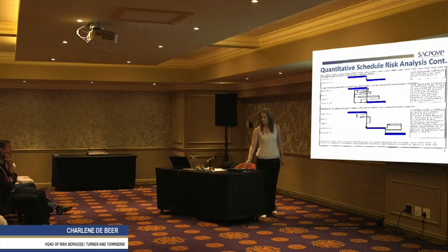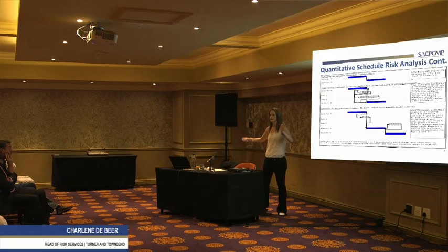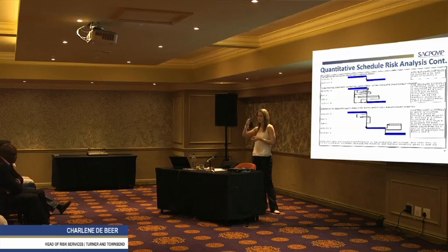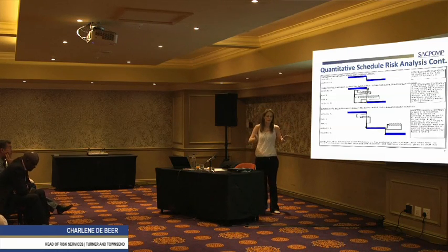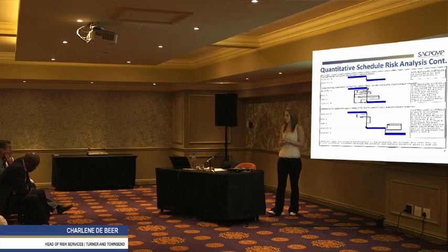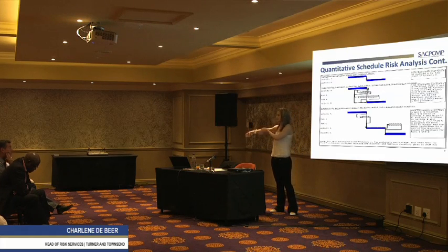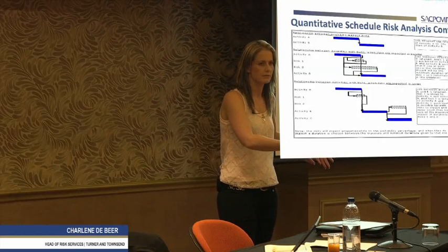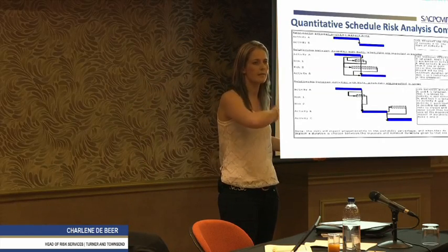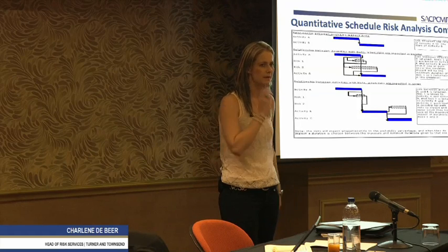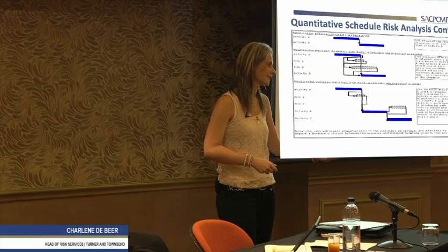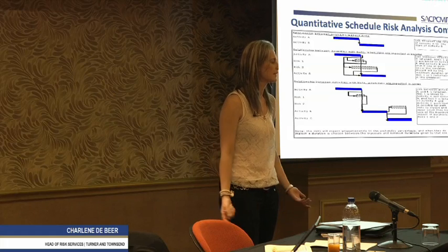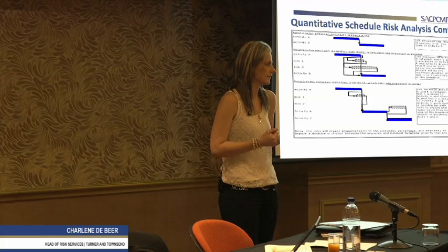So if I've got a risk register based on schedule and time, and I've costed those risks, I need to add it into the schedule as well. If I go to the board or Contractual or whoever and say I'm forecasting that I might overrun the schedule by 6 months, these are the risks, these are the reasons, it's going to cost you about this much. Because you can't take a monthly expenditure on site and multiply it by 6. You can, but then the question would come, how did you calculate it and how accurate is it?